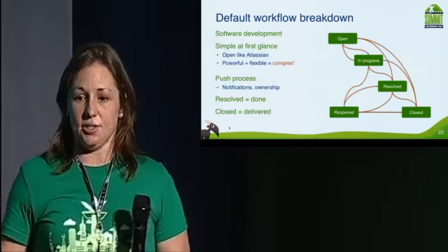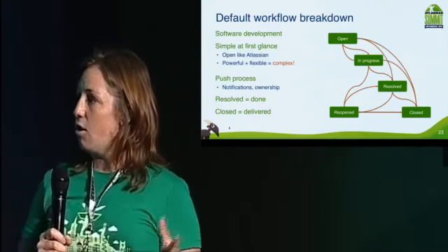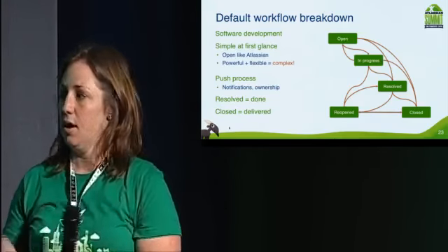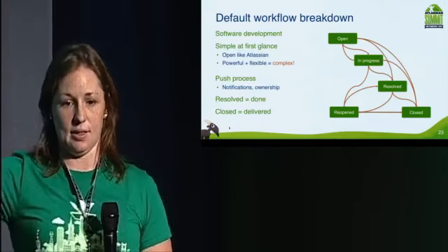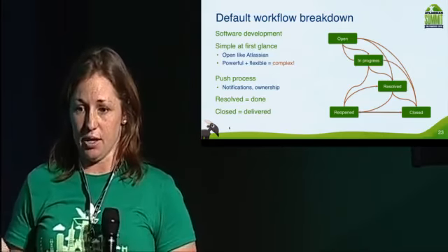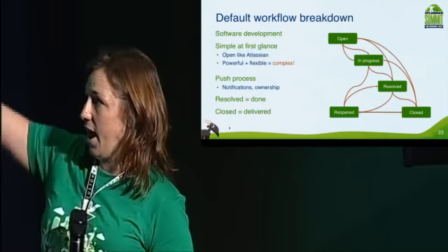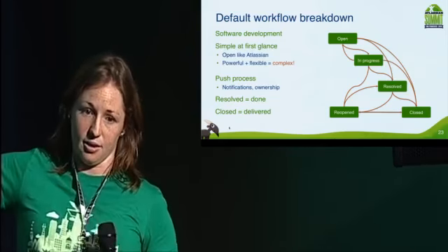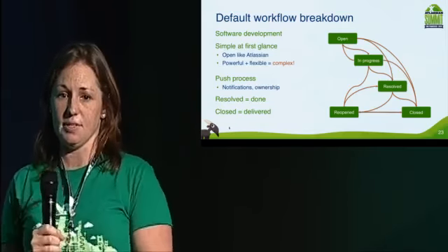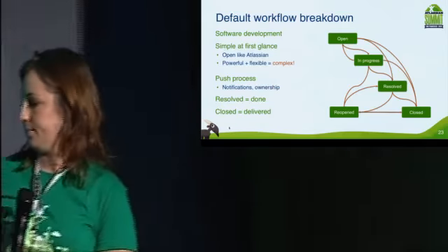And then there are these last two steps. Resolved is this idea that something is done, it's finished. Closed means that it's shipped, it's in the customer's hands. So remember we talked about flipping that switch in your resolution. That actually happens in the dead center of the default workflow. So there are 2 steps before and 2 steps after this resolution.